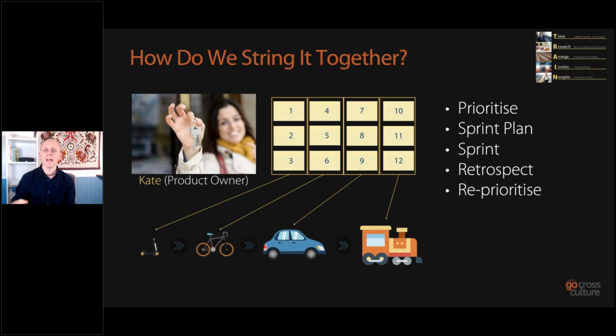And if you get that agreement up front and get that all agreed at a steering committee level, at a group level, then you should have less of a problem when you do report that up, with the caveat to say that this is not exact, this is not science. This is subject to being delayed because you've asked for it to be. They may just turn around and say, actually, don't worry, we've seen the first 3 sprints with the product owners well engaged, the sponsor knows what's going in, they're confident for you just to crack on.